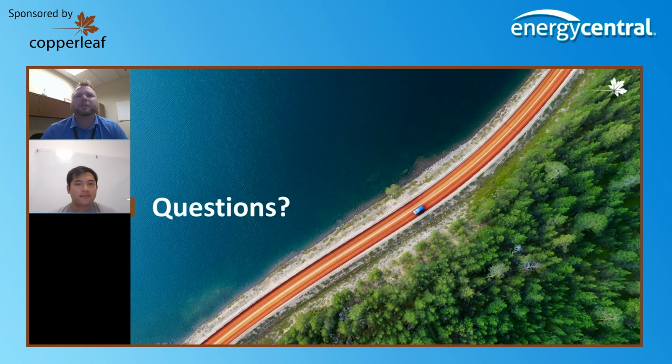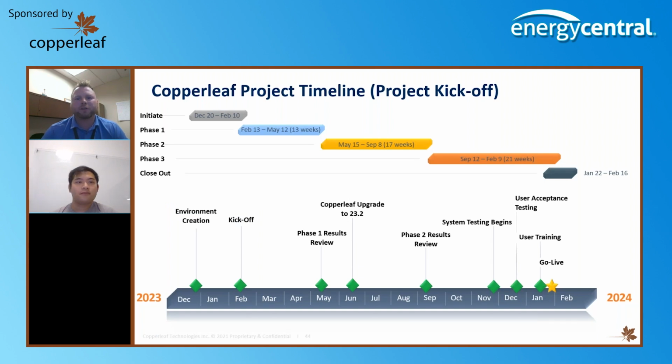We spent about 3 months evaluating technology solutions. Then from when we made the decision to move forward, it was roughly 14 months of heads-down work, with contracts executed and working with the Copperleaf team. They had 3 consultants on there. We had a dedicated person from our reliability group, and we pulled in subject matter experts as needed to have different conversations along the way.